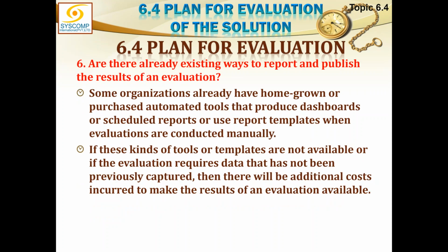Six is, are there already existing ways to report and publish the results of an evaluation? Some organizations already have homegrown or purchased automated tools that produce dashboards or scheduled reports, or use report templates when evaluations are conducted manually. If these kinds of tools or templates are not available, or if the evaluation requires data that has not been previously captured, then there will be additional costs incurred to make the results of an evaluation available.